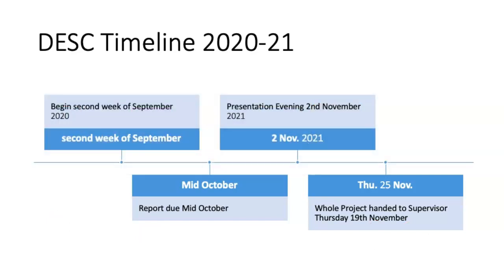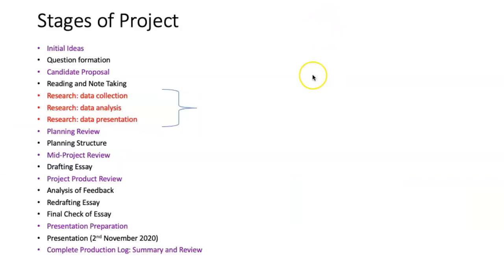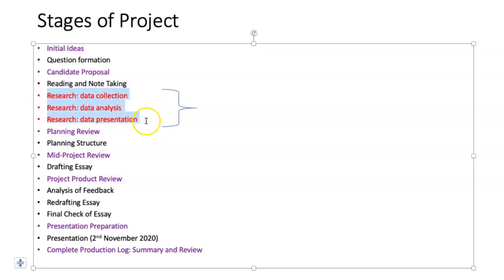In terms of smaller dates, in your project plan you need to refer to the initial ideas, question formation, the drilling down and narrowing of the topic. You've just finished the candidate proposal, some of you in December or finishing now in January. You could put down things about reading and note taking, whether you'll do different sections, and if you're doing primary research, you could refer to data collection, data analysis and data presentation. If you're doing a literature review, show exactly how you broke it down — by topic, by year, or by one side of the argument first and the other side later.